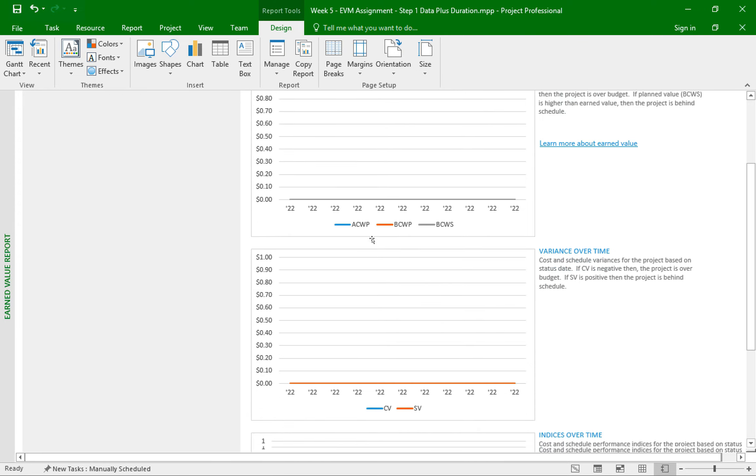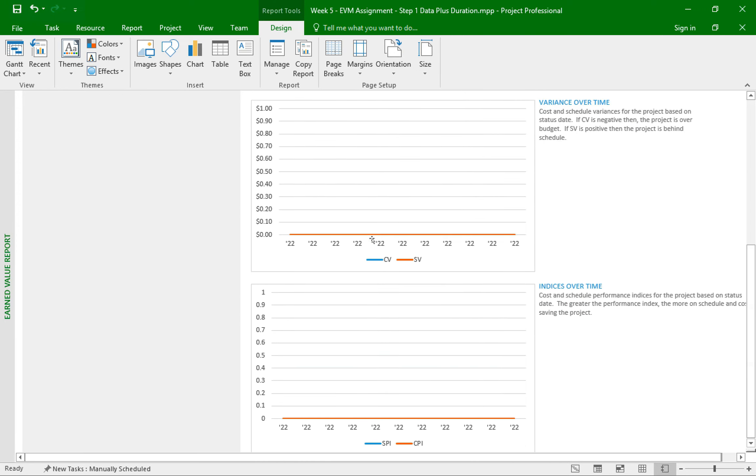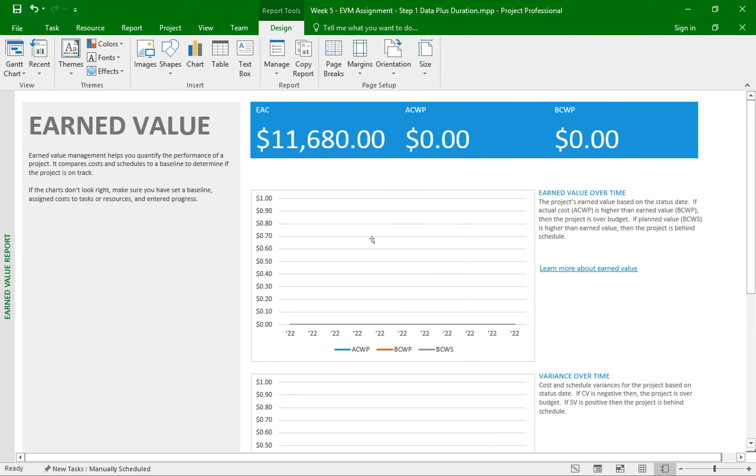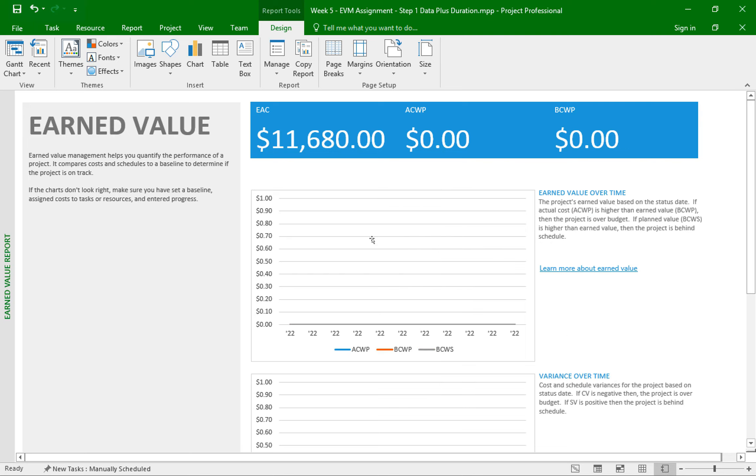But notice how the graphs are blank. And even these two values, which is the actual cost and budgeted cost, they're also zero values. This is an indication that something is not right, that we missed a step or two. And I did this on purpose as some of my students walk into this problem.